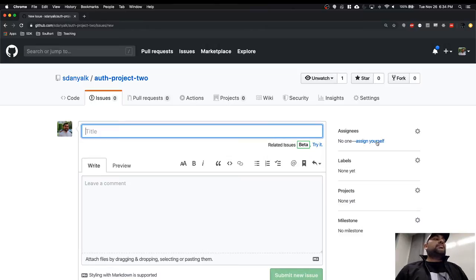A couple of other things. Remember the daily stand up. It's part of your Scrum or Agile methodology. What we do in daily stand up is, it's a 15-minute stand up. Everybody goes through and answers three questions: what I did yesterday, what am I going to do today, and do I have any roadblocks or impediments?